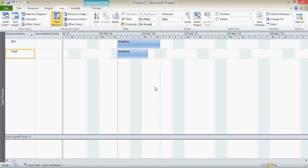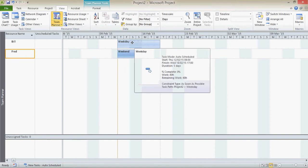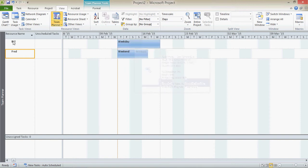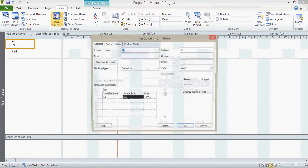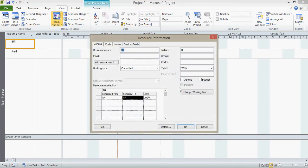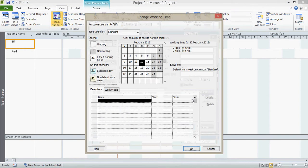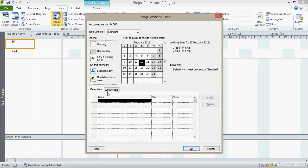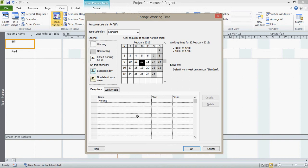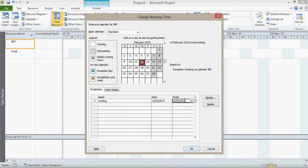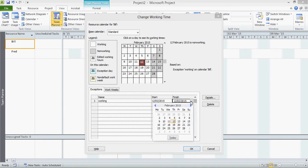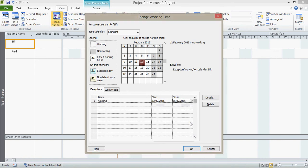We can do the same for Bill. So we can make exceptions for Bill, so Bill could work over that weekend. Double click on Bill. Change working times. I've now got the calendar for Bill. Yep. I'm going to put an exception for him working over the weekend. I'm going to click on there as the start day, but I can click here to set the second day.